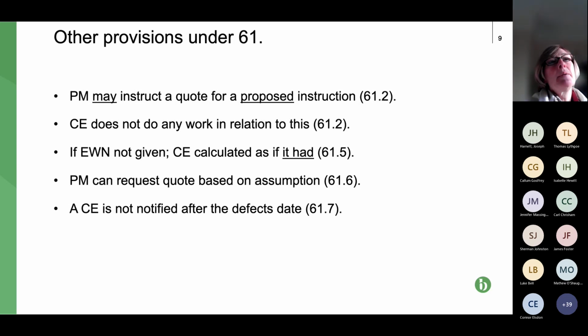So if the PM accepted all of it, but then said, but I'm not accepting the bit about the assumptions, then that's not an acceptance. If the PM accepts the whole thing, then it is effectively accepting those assumptions under contract law. So that would be the argument. But what I want you to understand is that there's no case law on it. So the argument comes with some risk, particularly if that assumption is high value.